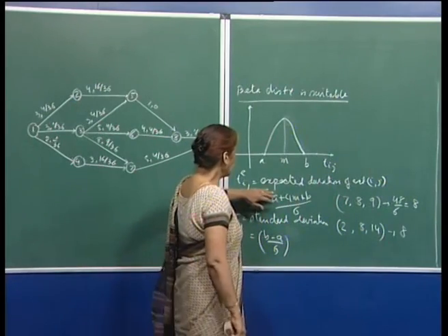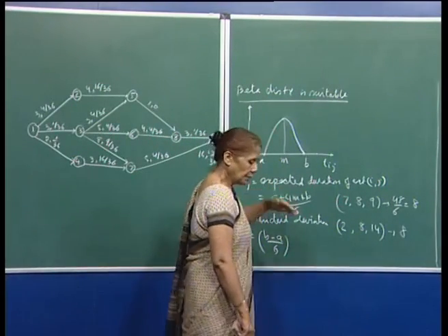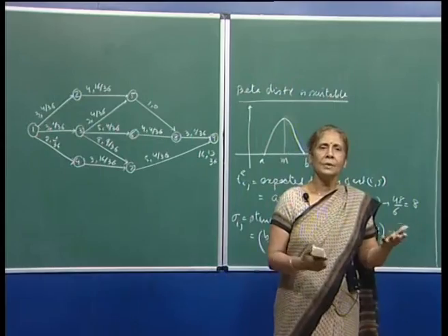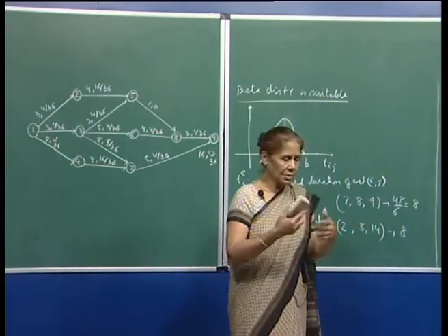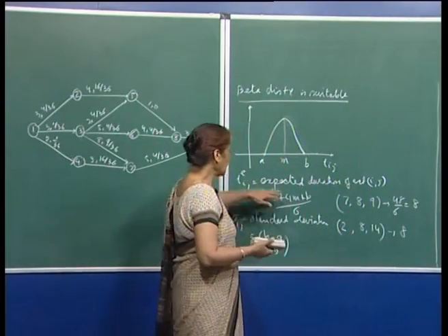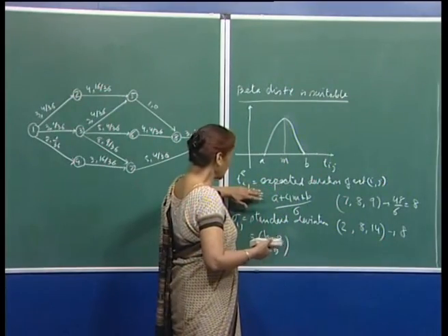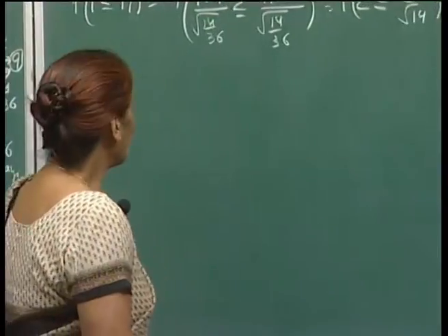So, once you have computed the expected duration, in some sense we will treat the computation as if the completion times are deterministic, in the sense that I have this expected duration of the activity, right.